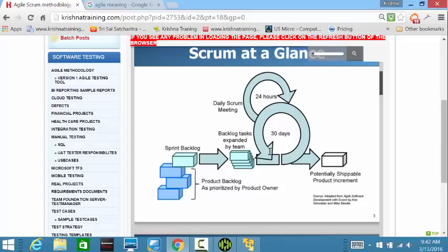Now, when we identified it, the whole project schedule got estimated at 9 months. There was no change in the estimation procedure, whether waterfall methodology or agile methodology. It's the same procedure: how much time would it take to complete the redesign of our application? We estimated around 9 months. And how many resources do they need for those 9 months? It's a direct relation. If you have fewer resources, your schedule will be longer.